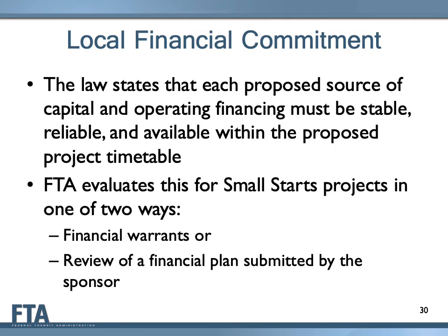The remaining slides in this presentation describe the local financial commitment evaluation process for Small Starts projects. The law specifies that each proposed source of capital and operating financing must be stable, reliable, and available within the proposed project timetable. FTA evaluates this for Small Starts projects in one of 2 ways: through the use of financial warrants or by the review of a financial plan submitted by the project sponsor.